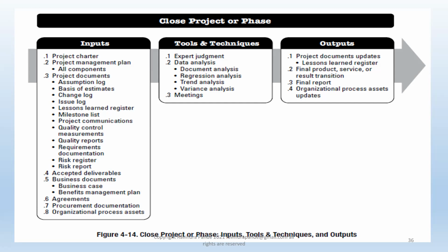Could we improve them? The quality control measurement is in terms of how many reworks we've done, how many rework hours we have consumed, and that's additional effort we required for this project, right? And there are some percentage benchmarks in terms of work versus rework scenarios in quite a good number of organizations. And we have to make sure we are within those marks. If we are exceeding those marks, then we have not executed our project effectively and efficiently.